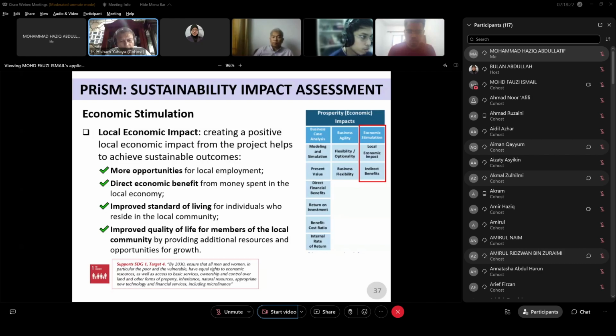But if you don't develop local talent and you bring everyone from home, for instance, if you are doing a job in Alor Setar, you bring everybody from Kuala Lumpur, then when you need additional manpower to complete your job on time, or to do an additional job, you are not able to use local talent because you didn't develop it. And then you have to bring people from KL. So this basically costs money, costs time, and will also impact the schedule.